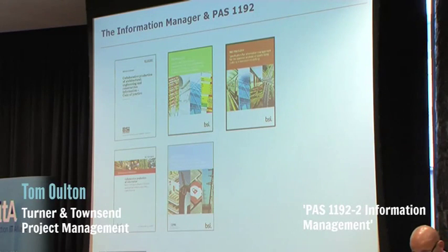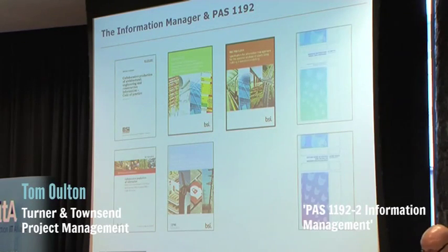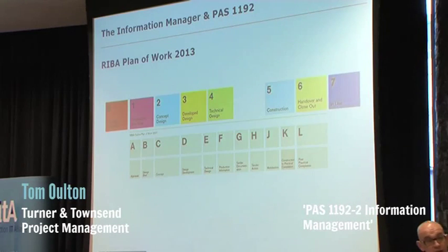We also have these documents from the Construction Industry Council. We've got the BIM protocol, and we have the scope of services for the information manager. These CIC documents, when they're applied to the contract, they are contractual and they necessitate the role of the information manager. So these should be applied to our projects. And it's not just the UK government and the CIC providing guidance.